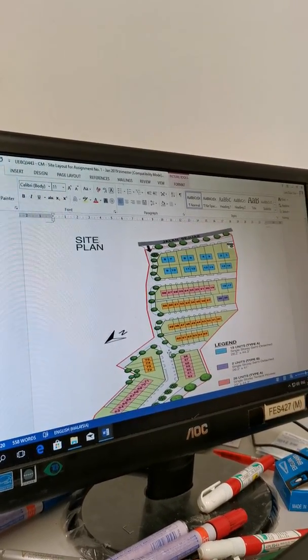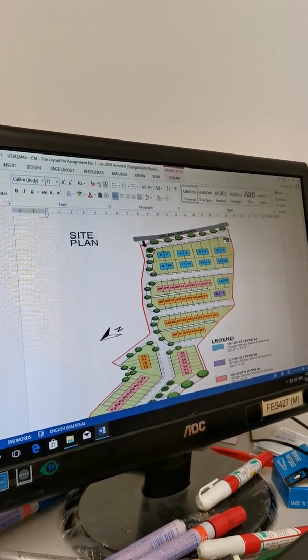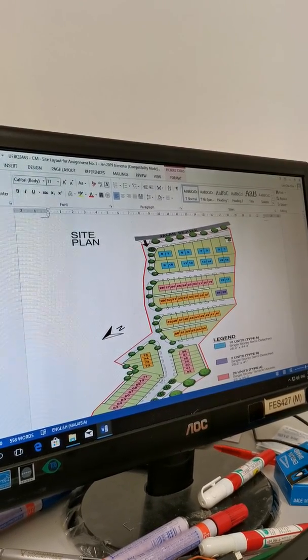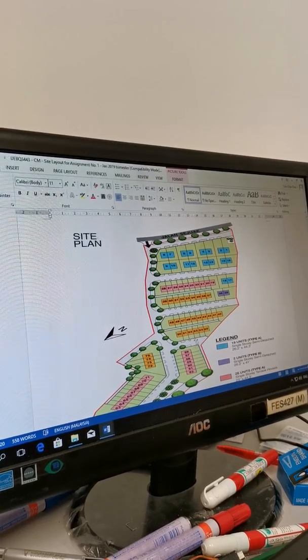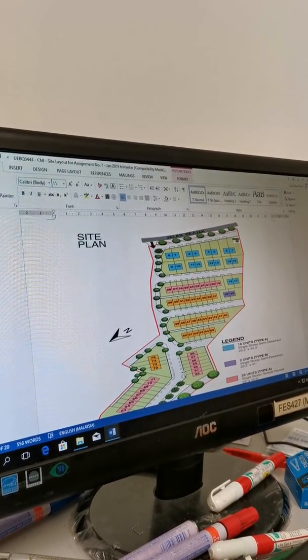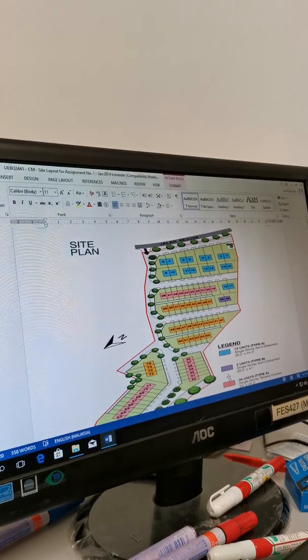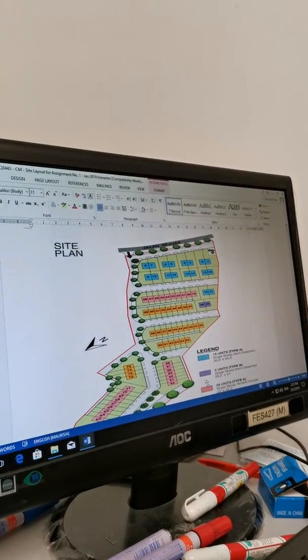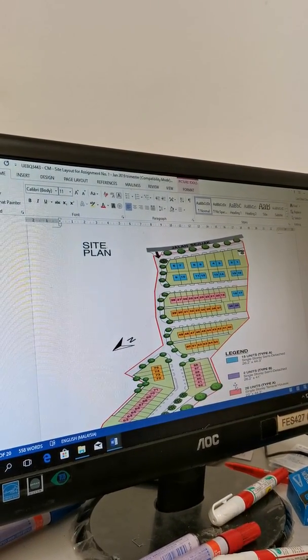Okay, so the next group, if we're talking about link houses, forget about all this blue color one lah. You just take out the link things lah. Then you see how many units to be done lah. So this one will only tell you because you're calculating for 1 unit for all your requirement. If it's 60, then you times 60. This is to size up your layout only.